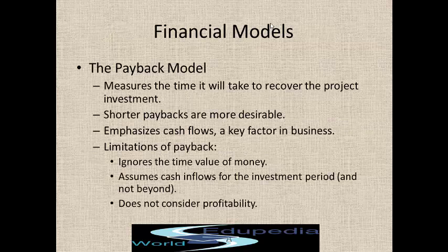If you look at payback in finance, the payback model measures the time it will take to recover the investment. Suppose you have invested 1 crore in a project and you need to find out after 1 year, 2 years, 3 years when you are going to recover the investment. How long is it going to take to recover your original investment in the project, whether 2 years or 3 years. Basically, your revenue and your profit should be equal to the investment amount. Shorter paybacks are more desirable. So everybody wants to reduce the payback time.